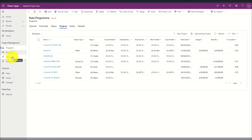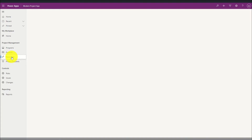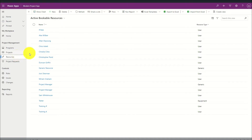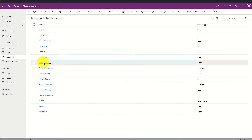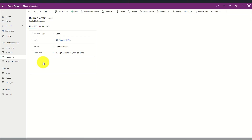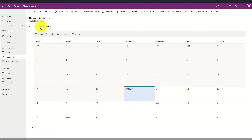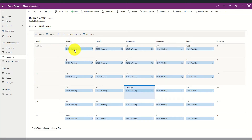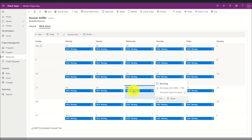We can navigate to the resources area to see a summary of resources that exist within the system. By clicking on a resource I can see more information and define custom work hours. Once the working hours have been defined, when users get assigned tasks these working hours will be considered during the scheduling of that task.